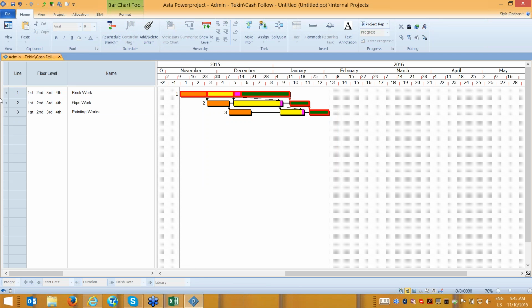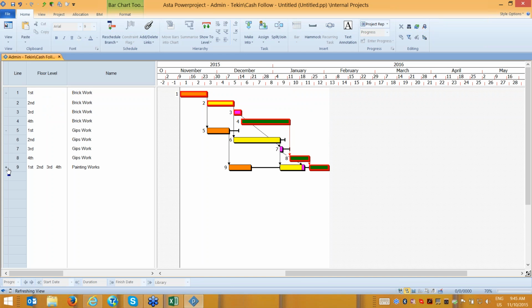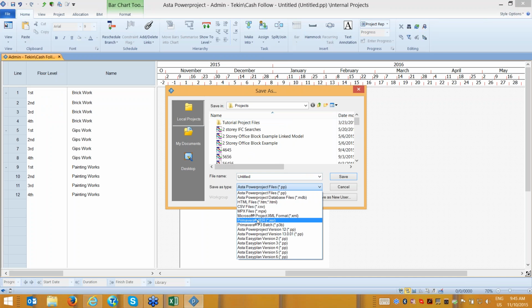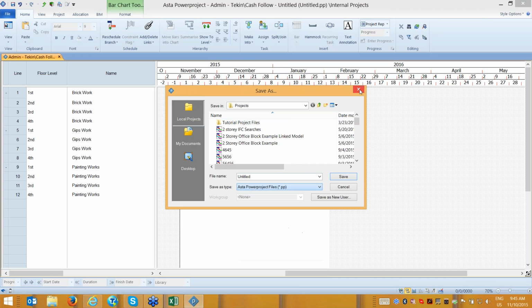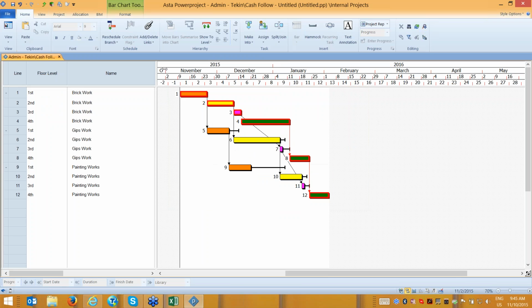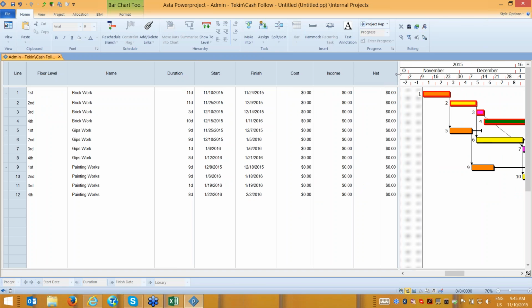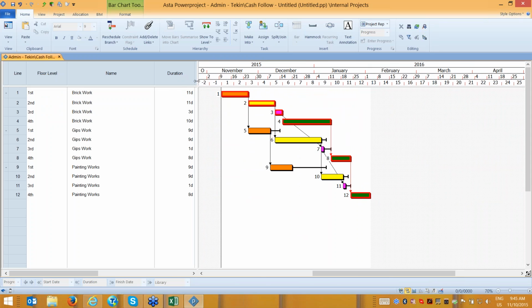It's created all the links. When I schedule it, I will see the logic. Please see that the system created all the links automatically, and I have the schedule, I have the critical path, I have float analysis, all done. It's very simple. I can again go and save this in Primavera formats or Microsoft format and provide it to my schedulers. Of course, I can edit cost here, I can edit duration here, I can edit all the information which is also required.